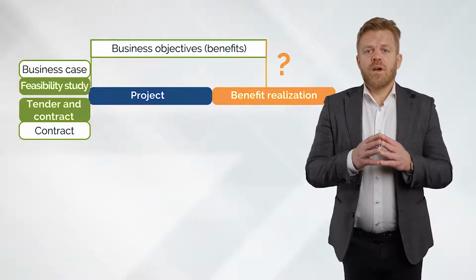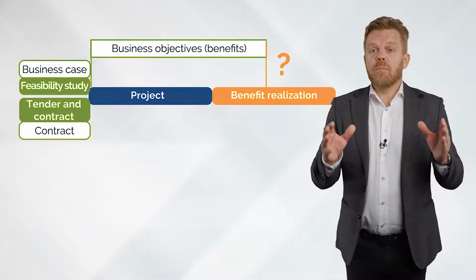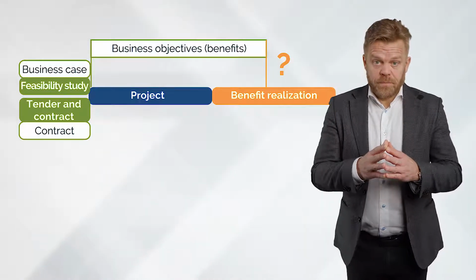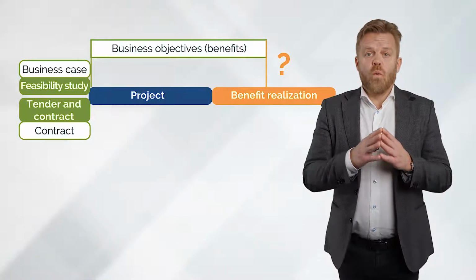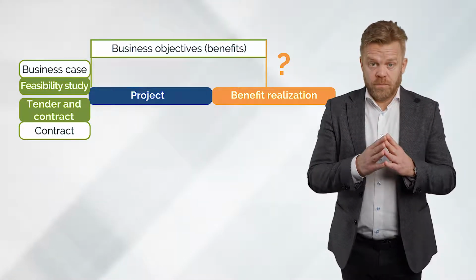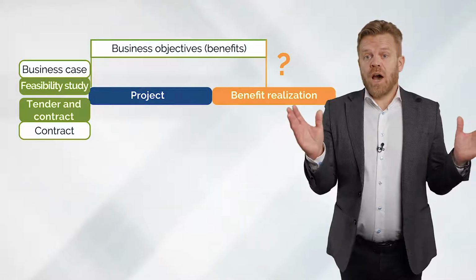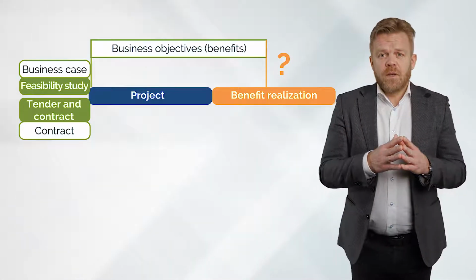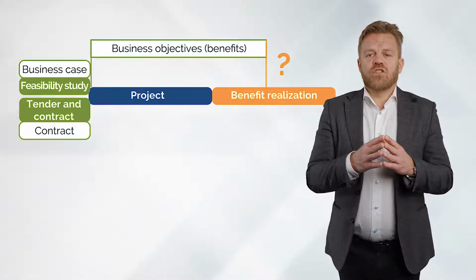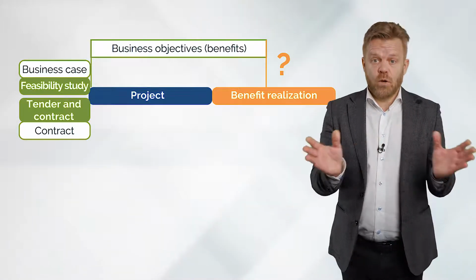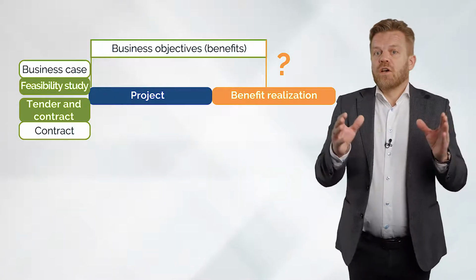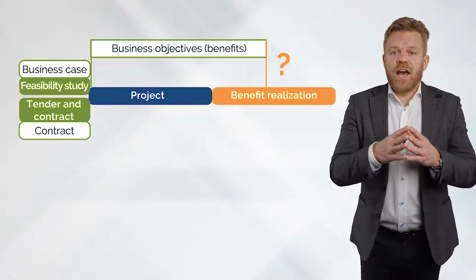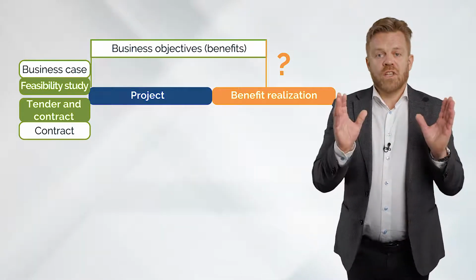Business objectives are the benefits we want to realize by means of the project. In other words, the effect we wish to achieve. Business objectives answer why the project should be performed. And business objectives derive from the business case or the contract with the client. Business objectives are the foundation or trigger for putting the project in motion. And once the project has been concluded, its business objectives are compared with the actual benefits achieved to assess how